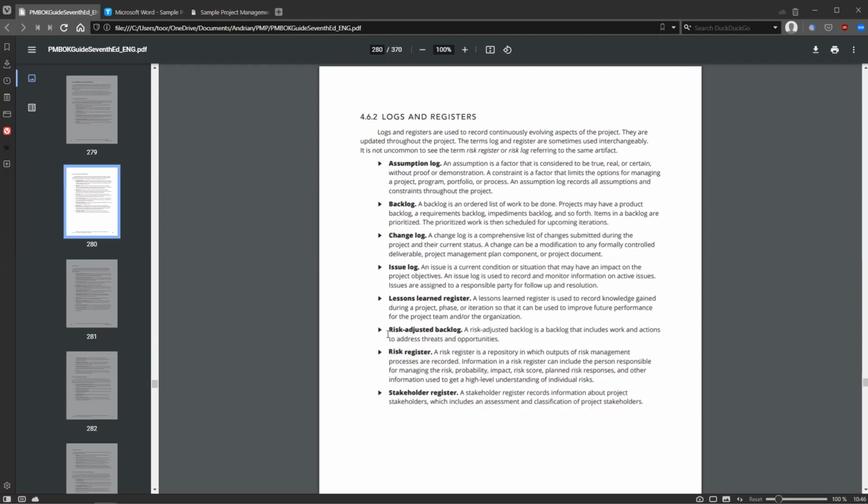And that's basically something that talks about how often do you meet, what do you discuss during these meetings, also when do you do certain communications within the project, like informing executive sponsor, let's say, or informing your direct sponsor. How do you keep everybody engaged, like sending out regular status updates, let's say. You document this within a communication plan.